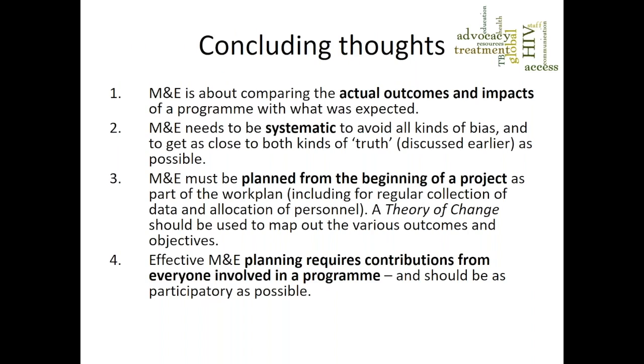If not, that's fine. First of all, M&E is about comparing actual outcomes and impacts, or what actually came out of it, with what was expected. Secondly, M&E does need to be quite systematic. It doesn't mean that you can't collect qualitative-based information, but it should be collected within a framework, so you know at least that there are some concepts which you're addressing. Thirdly, M&E should be planned right from the beginning of the project, and a theory of change should be used. I would certainly recommend for all projects a theory of change, because it makes you really think right at the beginning of a project what you want to have at this point and this point, and what the link is between them all. And I think that link is so important to be able to describe.